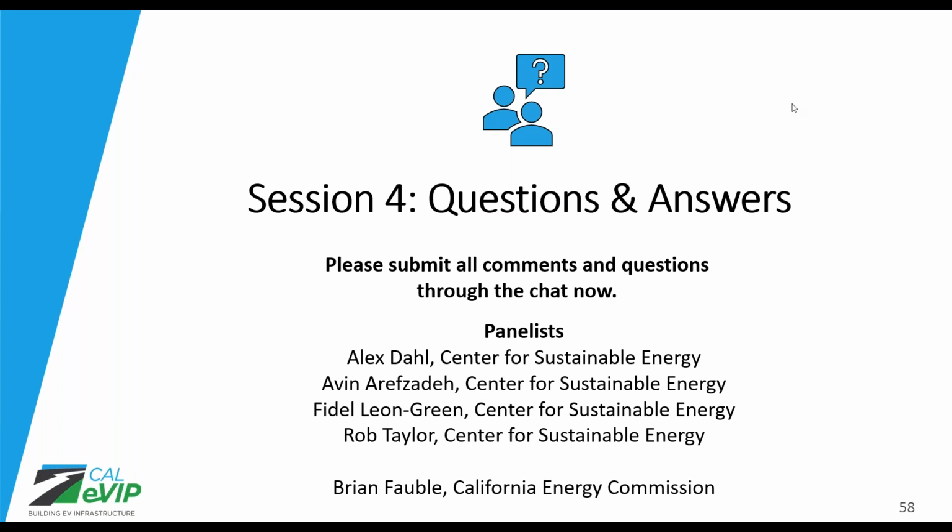Next question for Alex. Is EVITP certification required from installer for a site to receive a rebate? Yes, we are upholding the state requirements that EVITP certification requirements must be met. If EVITP requirements are not met, you will not be eligible for funding. You will not be eligible to receive your rebate. So again, I highly recommend that you understand the EVITP requirements before you begin your project. For example, the EVITP requirements state that at least one EVITP certified electrician be on crew at all times. And depending on the size of your installation, that may increase. You may be required to have more than one.